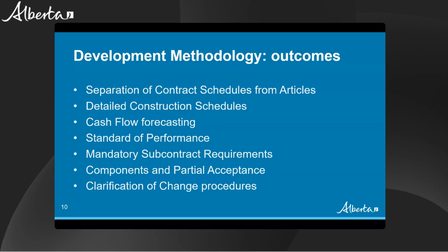Construction schedules. Our feedback through the development process also indicated that there was often difficulty understanding the parameters of the construction schedule development process. The whole scheduling process has been completely revised with clear, step-by-step requirements for what a detailed construction schedule requires. The new detailed construction schedule provision includes the method of development, level of detail, submission deadlines and details, formal acceptance by the province, and effective revisions.